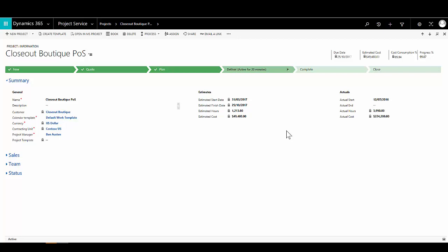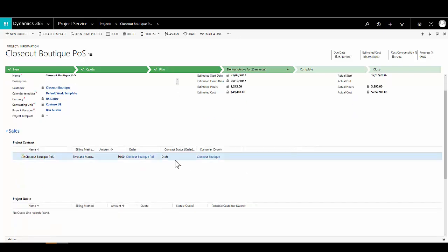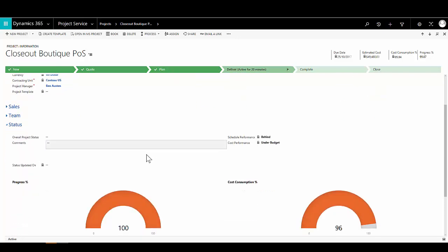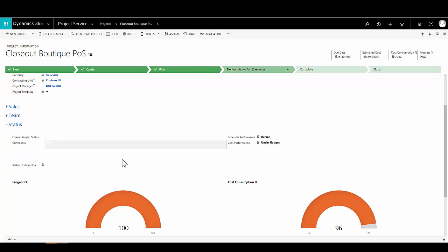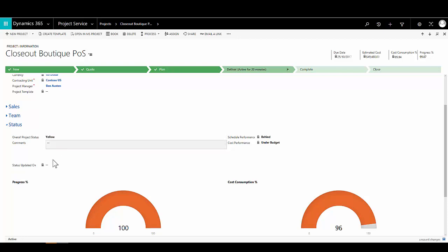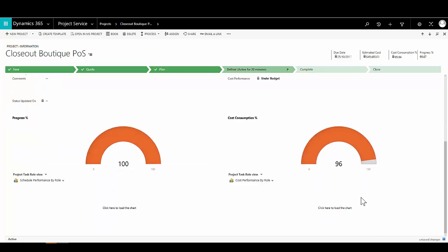On the right-hand side we have estimates of start and end date, expected hours to complete the project, cost of completion, and then actuals — actual start date, actual hours spent, and actual costs incurred. The sales area shows any contracts associated with the project, including the billing method — time and materials or fixed price — and the price list covering cost price and charge-out price for each resource. Finally, the status section shows progress in terms of effort and activities completed, budget or cost consumption, and an overall red/amber/green project status.